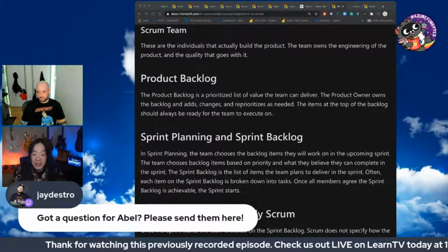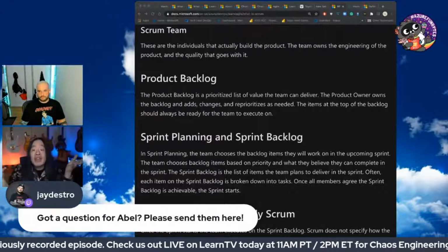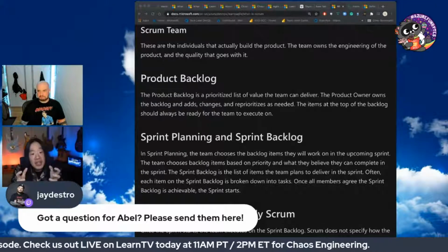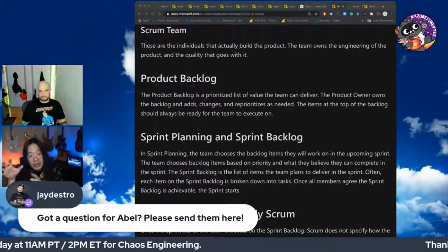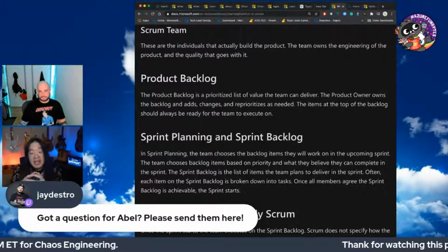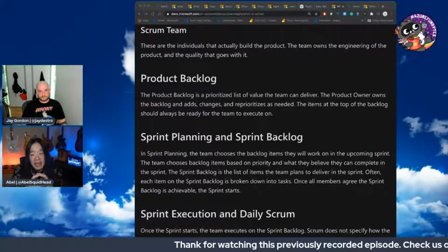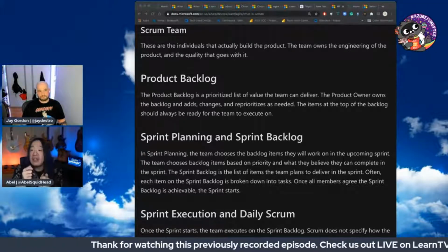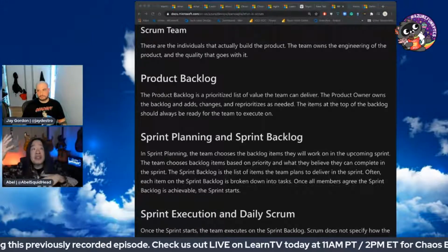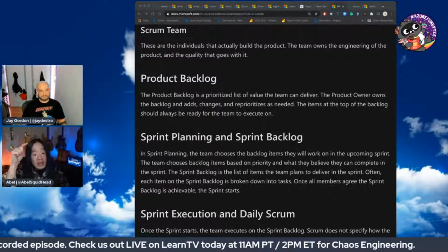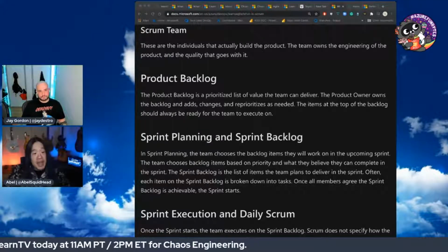Sorry, the Scrum Master's job is to drop the hammer on them if they're not doing things in terms of Scrum best practices. So you need to have someone that has the will, has the clout to be able to do that. Also, the Scrum Master's job is to stop and unblock any impediments that the team has. So oftentimes they have to go and deal with other people within the organization, within the companies, all the way up to CVPs or even CEOs to say, no, you cannot ask my dev teams to do that because that breaks Scrum best practices as well.